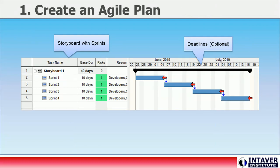Here we see a sample Agile plan that will use four sprints to deliver a completed storyboard of capabilities. Each sprint lasts two weeks for a total of eight weeks. Each sprint is assigned resources — developers, QA, and documentation. Resources are useful for this analysis as some issues only impact specific resources. Adding deadlines can be a useful visual marker.